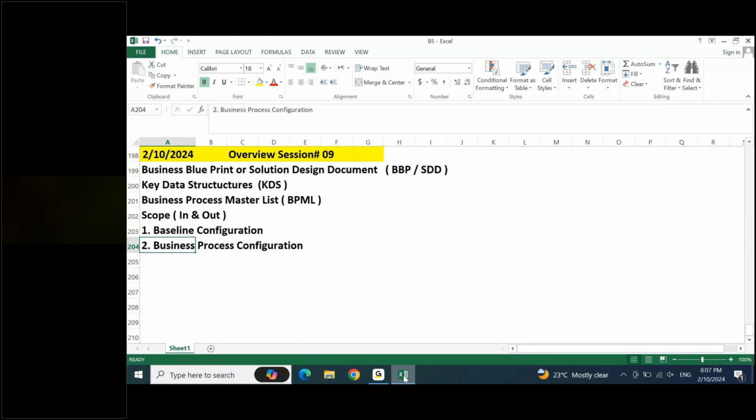You will be telling your client, we will take up this requirement, but this is a new, additional requirement, which will require maybe 3 weeks of effort. For these 3 weeks, this will be the cost. If you're okay with it, we will do this requirement also, but this cannot be completed in the month of November. This will be completed a month later. So like this, you will be getting the additional requirement. You will be giving the effort estimation to the client. If they agree to it, then you will proceed along with it. If not, they will tell us if this cannot be done at this moment, we will give the requirement later on.